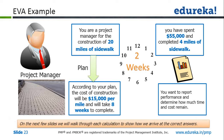Before we get into the detail, please remember earned value is always done with respect to the dollar value. So we can also say that in eight weeks' time we are going to complete work worth so many dollars. First, we need to identify how much work we were supposed to complete.